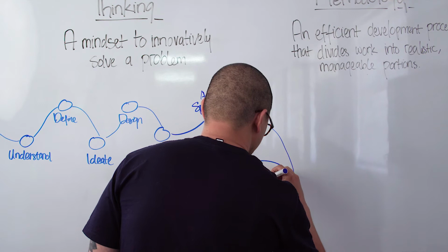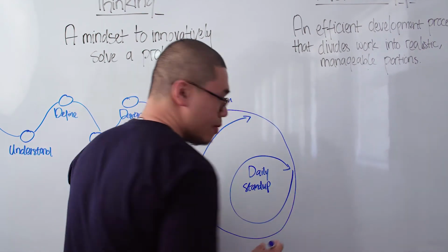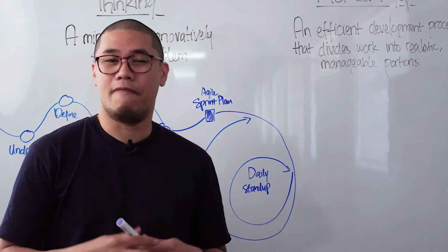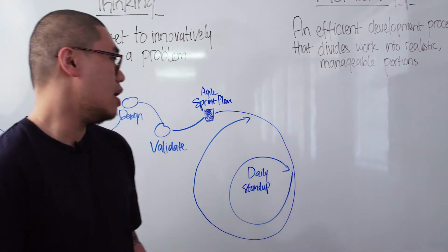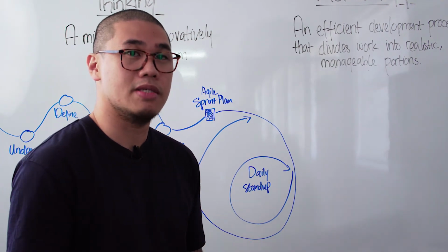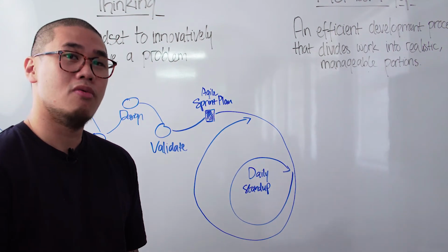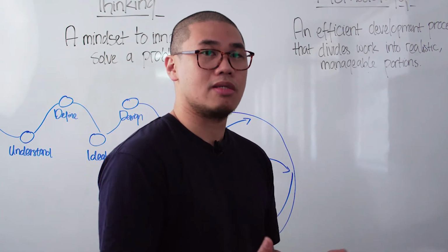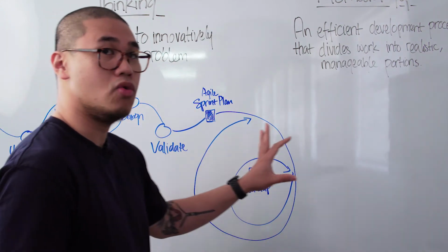And if you don't understand what a daily stand-up is, it's when Agile teams gather around every single day, typically in the morning, and go through a round of 10-15 minutes of trying to address issues, trying to cover all of the topics that they are going to cover on that day, and try to make the rest of the team members aware of what their priorities are, what they are going to achieve, or understand any type of blockers that they may have that the team can contribute to and give some ideas on how to solve. But this runs for another 1 to 2 weeks typically.